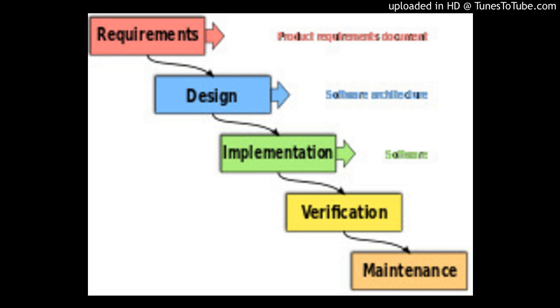The key emphasis is on fulfilling the business need, while technological or engineering excellence is of lesser importance. Project control involves prioritizing development and defining delivery deadlines or time boxes. If the project starts to slip, emphasis is on reducing requirements to fit the time box, not on increasing the deadline. It generally includes joint application design (JAD), where users are intensely involved in system design, via consensus building in either structured workshops or electronically facilitated interaction.